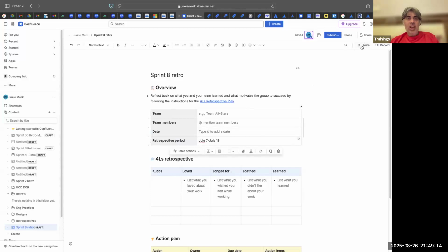Then you share it with the team and let them come, and they will put what they have liked, disliked, and what they have learned. Once they put in all the information, then you can facilitate. A lot of people have loved this. A lot of people want this. A lot of people dislike all this. So you get a discussion going, and initially you can facilitate it, and then you can rotate it.